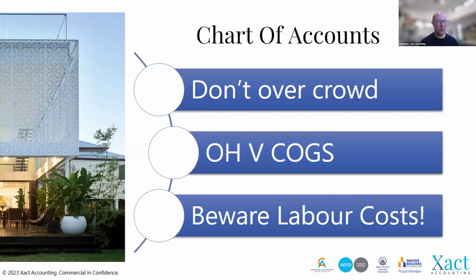It's a good little distinction there that you have these tracking codes, and there's a few levels of that, because there's a question about being able to allocate in Xero Me to actual work that's been done, whether it was framing or fix out, etc. So you can have a job code, but then you can have an activity code as well. You can do 2 layers, yes.